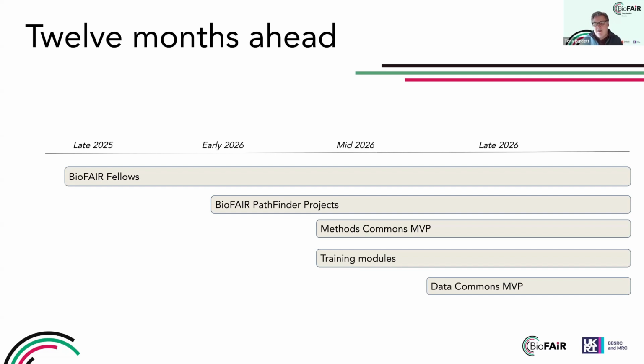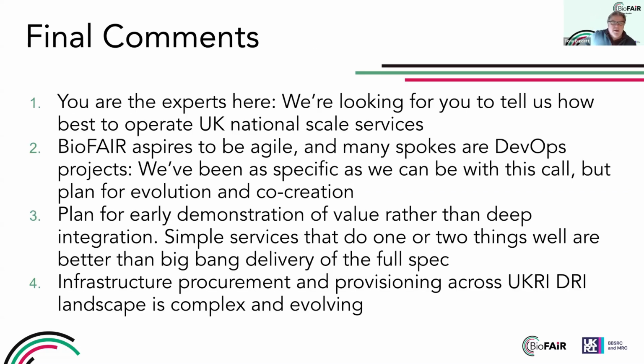And then we're hoping that the Data Commons will be funded later this year, maybe getting towards a Data Commons MVP towards the end of 2026. So there's opportunities for integration and interaction between Methods Commons and those services as we come on stream. However, we want to try and avoid these really tight dependencies and tight coupling. So planning within your application about what to do in the meantime is valuable.